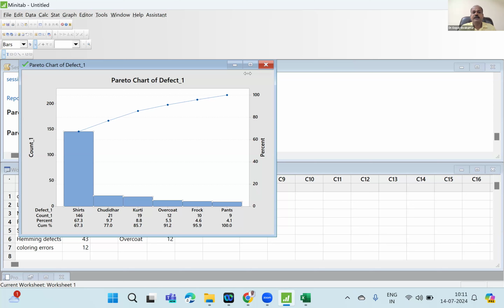Yes or no? Yes, possible. If you want to take our support, project mentoring, our guidance for doing a project, the first thing you should do is drill down a problem. Make this problem very, very specific, and then understand the scope. Don't bring everything into the discussion, or nobody can understand you. Identify a specific defect from a specific product. If further deep diving is possible, do that also.